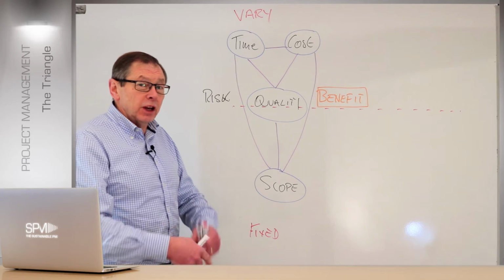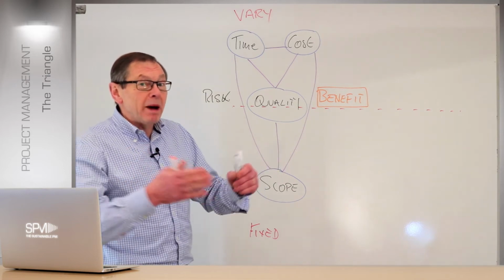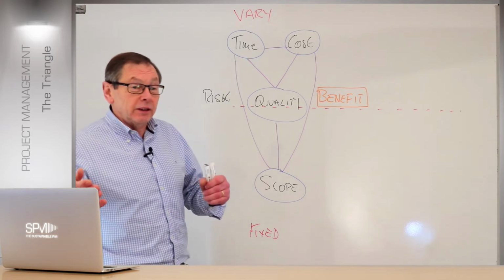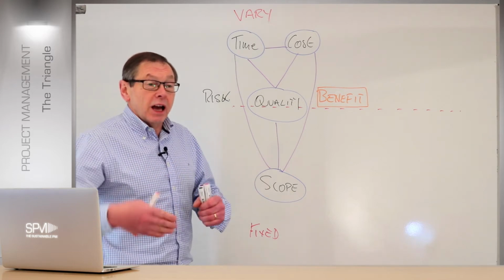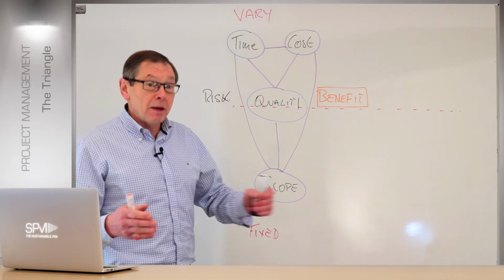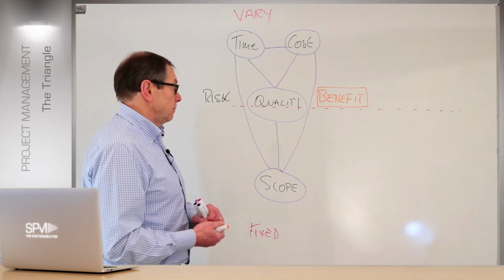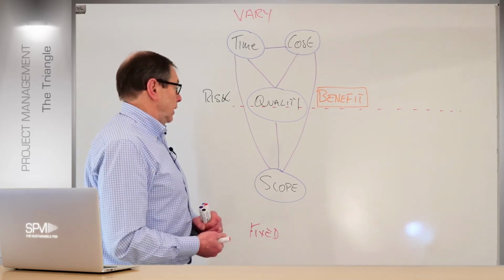This is really managed by exception and a point of empowerment, right? This doesn't give you a boundary to use that space. It's more about triggering an escalation because you're going beyond those bounds, but allowing you, having empowerment, to work within those boundaries to start before you need to do that, right? So it's a guidance, as again, right?